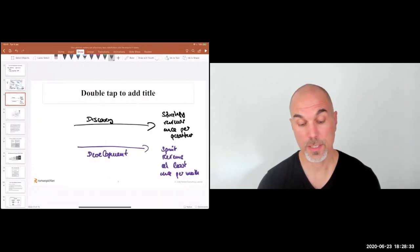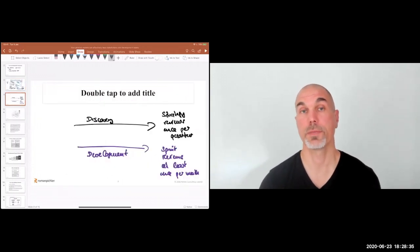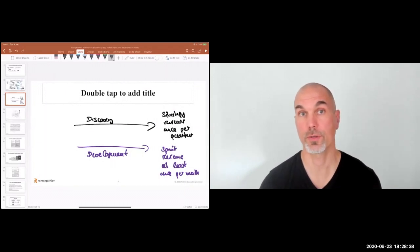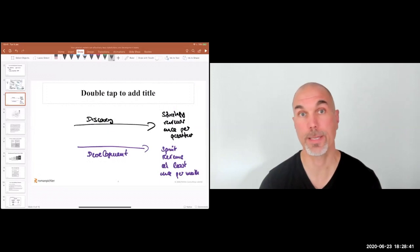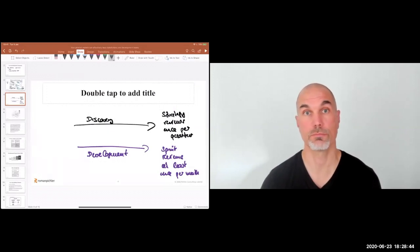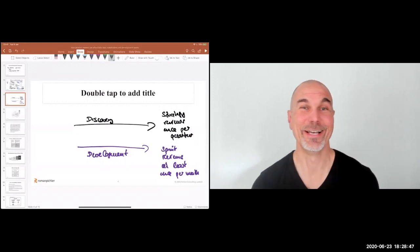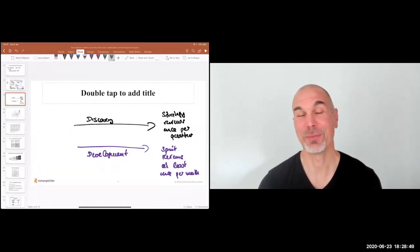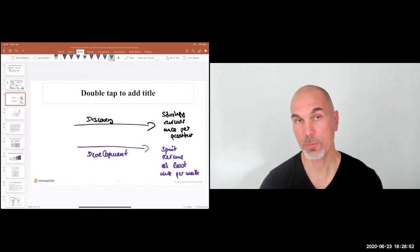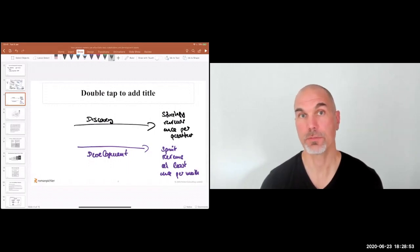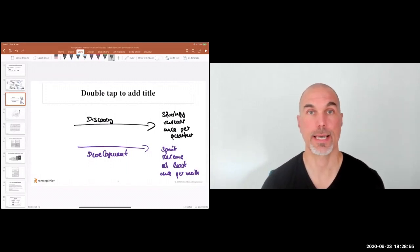With continuous discovery, my rule of thumb is for the Scrum product owner to spend at least about half a day per week in discovery. Some people like to literally spend half a day, others do a little bit of discovery every day — an hour or so. What's important is to plan it in and block time in your calendar.